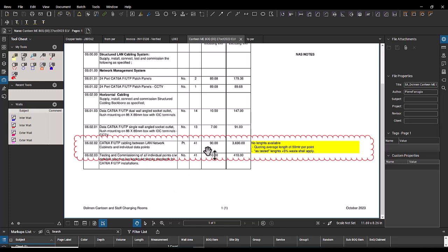Okay, let's say for example lighting points. The lighting points also include the cost of cable from the panel and the conduit. Don't say you have to measure them and apply the divided rate. I don't think so. I mean, it doesn't make sense a little bit, the comparison, but it's kind of like that.